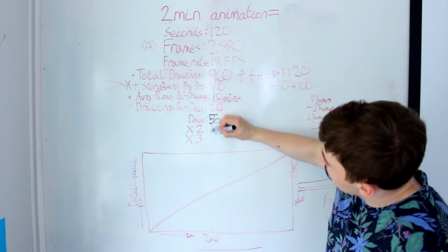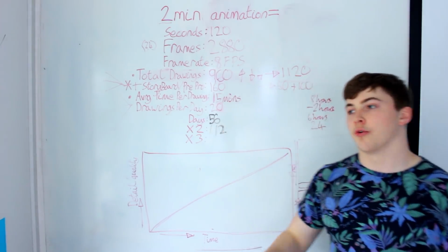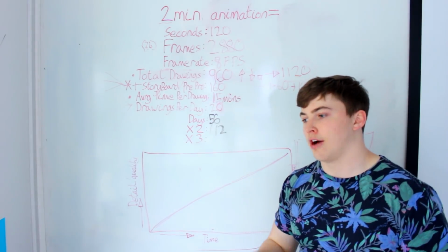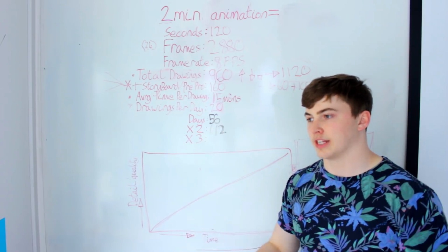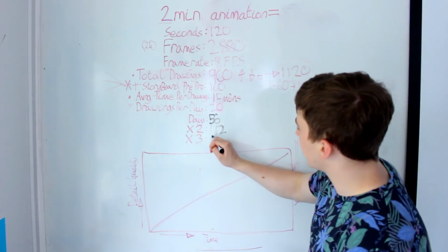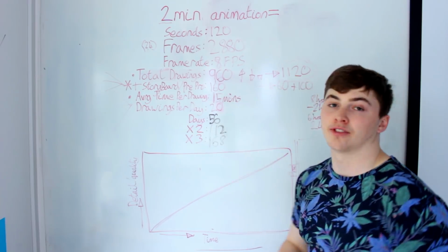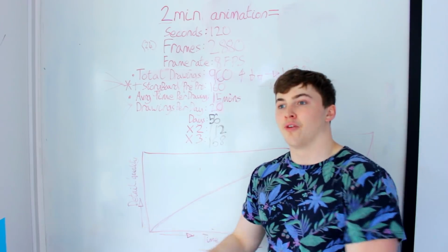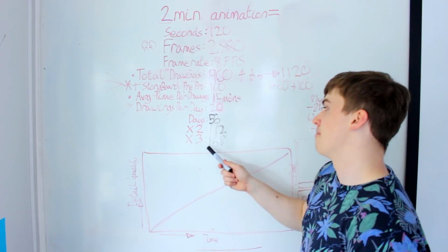And this is the number that I give to clients. I give the times 3. So if a client is saying, we'd like to work with you, we can pay you and everything, how long would it take? I would give them 168. And that is just to be on the safe side, guys. The more you create, the more you realize there is to do where you didn't realize it before. So this is a nice safe number now.